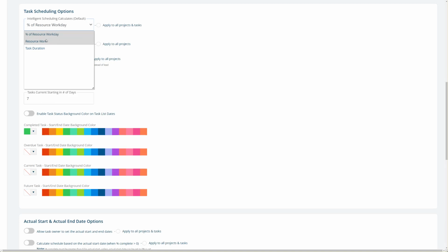You can change this though, so that you provide how much duration, 5 days, and say a percent, maybe it's for 5 days, 25% of their time. Then Project Insight will calculate how much work it is. Or if you choose duration, you can do the same thing and provide 25% effort to get 8 hours of work done, and it'll figure out how long the task will take. So that's what this setting does. It allows you to have a default calculation.